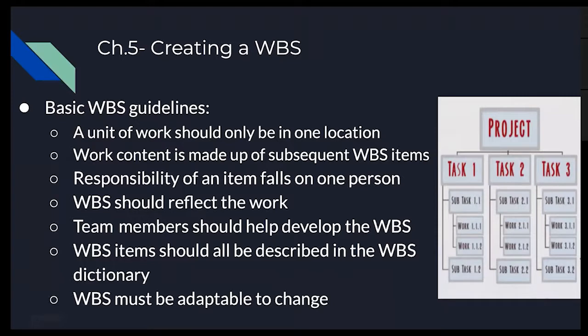Furthermore, the work content is made up of subsequent work breakdown structure items. You reference the picture on the right, you can see project made up of 3 tasks, and each of those is made up of 3 subtasks and work items. So really you can see that one branches into many. Now, the responsibility of an item falls on one person. This doesn't mean that one person is going to work on the item by themselves. It just means that they're responsible for the completion of it.